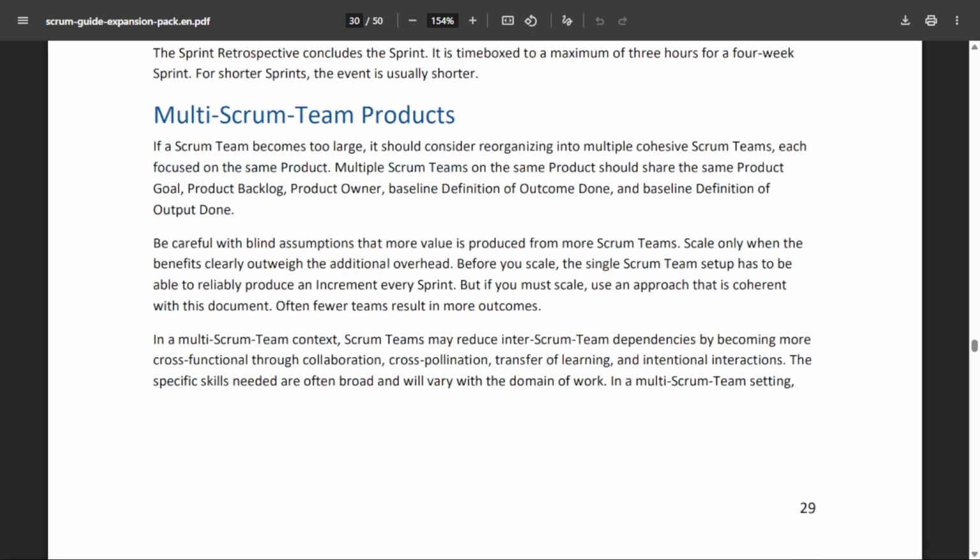Also here we have the concept of multi-Scrum team products. Now this could be extremely helpful for those who are thinking of needing to somewhat scale. If a Scrum team becomes too large, it should be considered reorganizing into multiple cohesive Scrum teams, each focused on the same product.